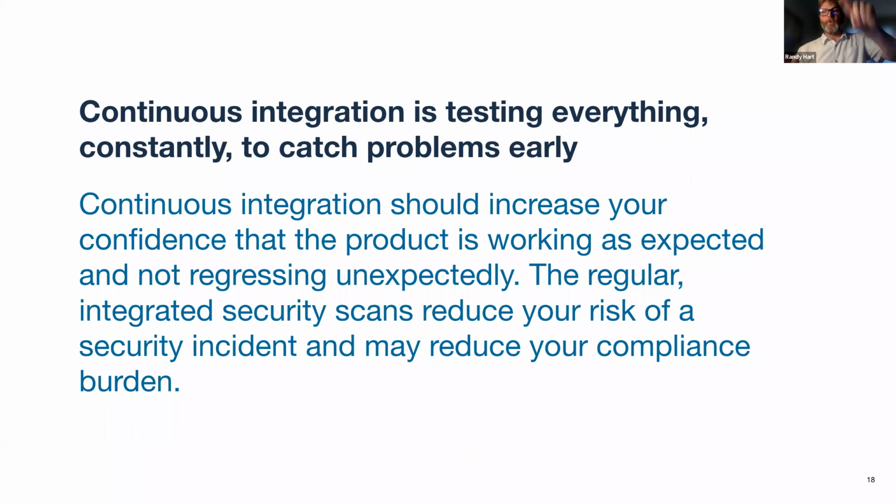had some problem way down the line in some other environment that they couldn't figure out because they hadn't built that continuous integration from the beginning. And so they didn't find it until the end when they were trying to integrate all the systems. And that led to weeks and weeks of challenges. And this is what this is trying to get away from. It is get into doing that continuously so you're not having that risk at the end of an integration break.